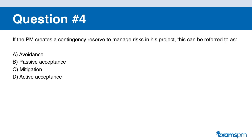Let's move on to question number four. If the project manager creates a contingency reserve to manage risk on his project, this can be referred to as: A: avoidance. B: passive acceptance. C: mitigation. D: active acceptance.